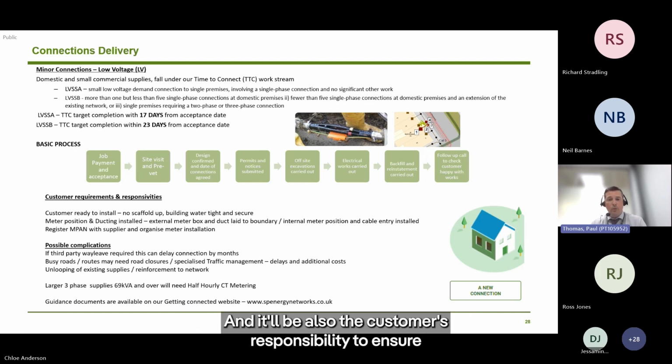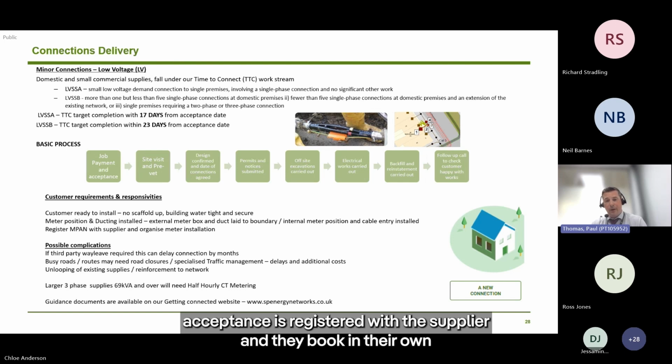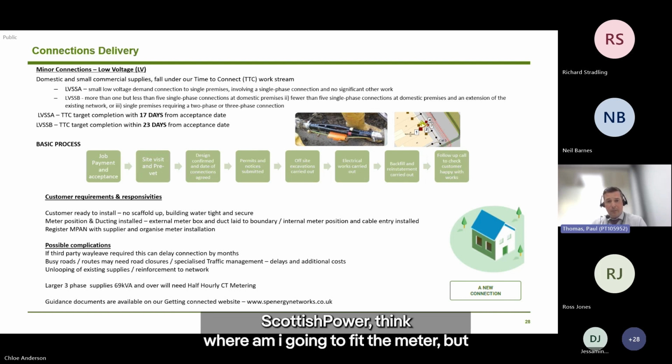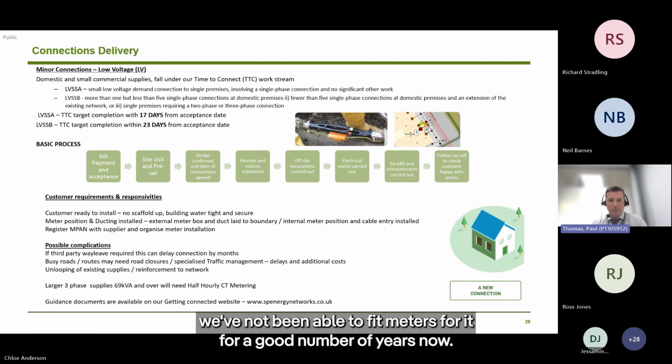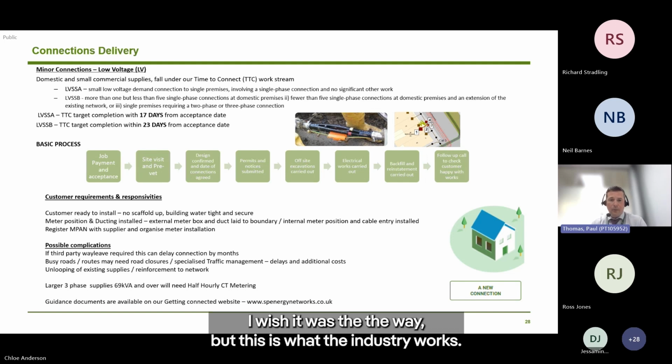It'll also be the customer's responsibility to ensure that the MPAN that we supply on acceptance is registered with the supplier, and they book in their own meter installation. That sometimes becomes a bit of a confusion because they see SP Energy Networks and Scottish Power and think, well, I'm going to fit the meter, but we've not been able to fit meters for a good number of years now. I wish it was the other way, but this is the way the industry works.